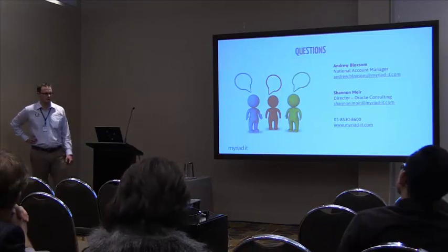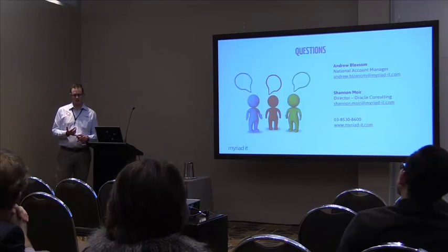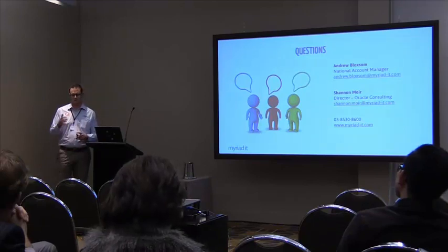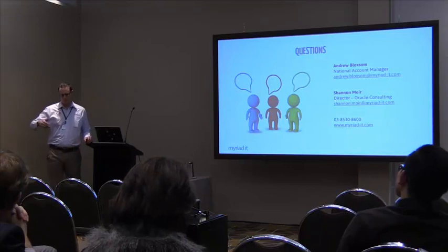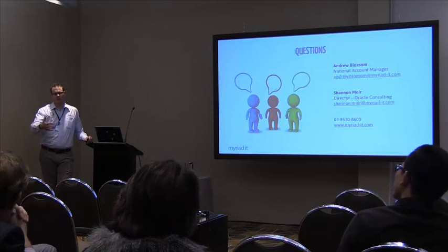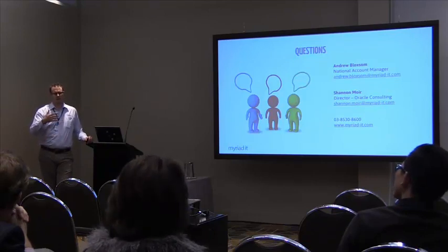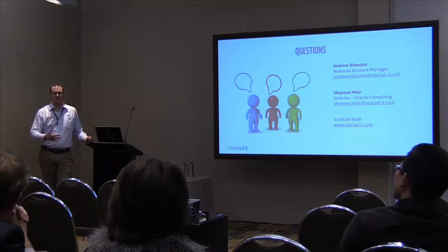Yes. With the bigger jumps, I go straight away to testing and training. That's one thing I talk to people about all the time, because some people haven't even seen the new 9.1 and its look and feel, and the impact of changing that UI. Every person has to go through training, so there's time there. If you're going from 9.0 to 9.1, they've already seen it, not really a major impact.